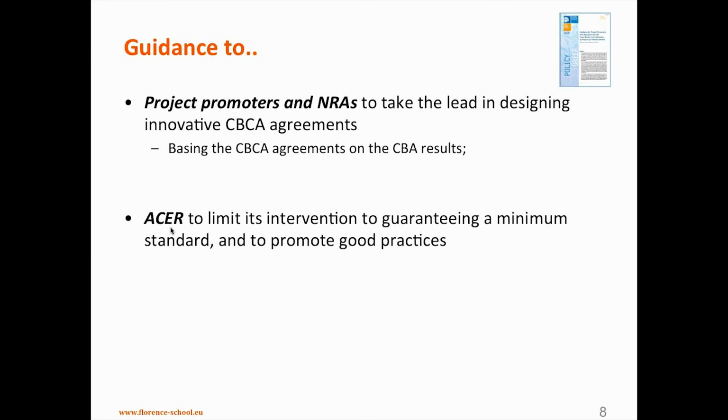Well, there are 3 dimensions to an innovative agreement. One is to base it on the cost-benefit analysis, which we will have anyway, because all these projects of common interest have gone through a CBA method. So we can use it. It doesn't mean we have to strictly apply the beneficiaries pay principle, but we can use it as part of a negotiation and as part of an agreement that is in the benefit of both countries, not only the country that is compensating the other.